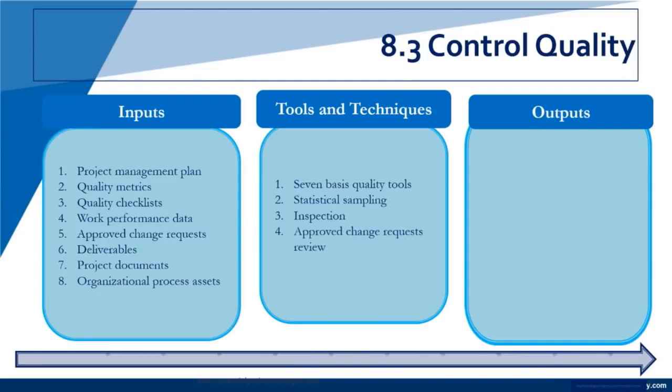And we looked at approved change requests and reviews of those. We want to know in the change management realm, when we're talking quality, did we avoid dropping the quality when we changed anything? Did we introduce things we need to look at in a change, in a quality kind of mindset? So we're going to look at the approved quality reviews and the approvals, anything that's changed through that process to make sure that everything is in line.